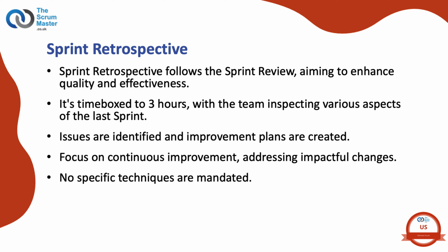Potential solutions for the highly ordered issues are explored. 3. Plan and amp actions. Identify a limited number of actionable improvements the team will implement as early as possible. Most available time should typically be spent on the Plan and amp action section. The sprint retrospective should result in an actionable plan that the Scrum team will implement in future sprints, which will help them to improve their ability to develop the product continuously.